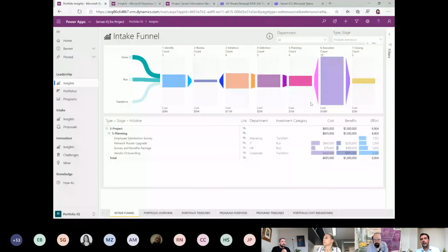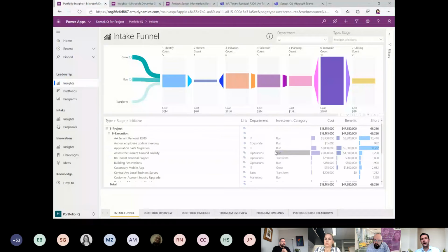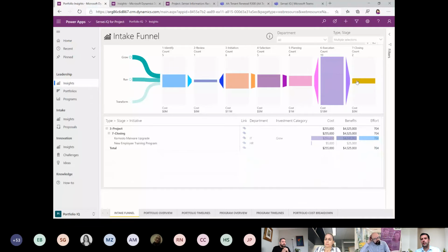And so, yeah, it actually has a plan put together, and then we'll start to look at how that work is going to flow on through into our execution phase. And this should be, again, a live view of everything that's in progress and how it's tracking, so we'll get to see everything that's underway at this point. And then we try to have a formal closeout process as well, looking to make sure that we do finish things off correctly, that we put the right governance over it to close it out, and that we have lessons gathered from it and all the PIR activities completed as well.